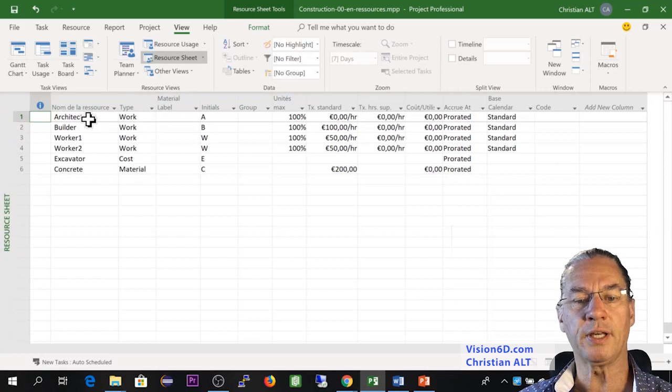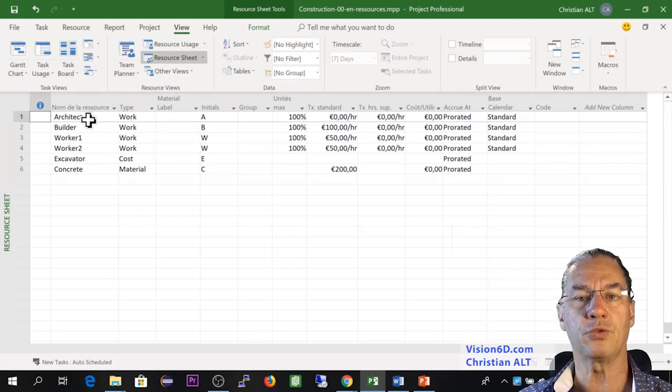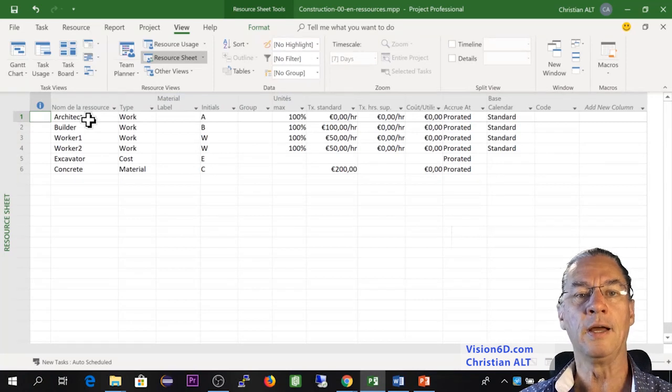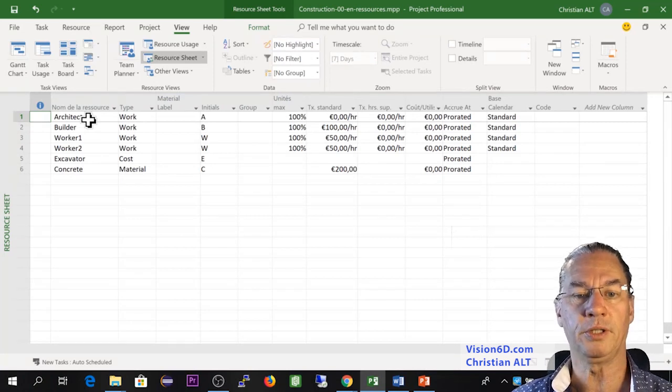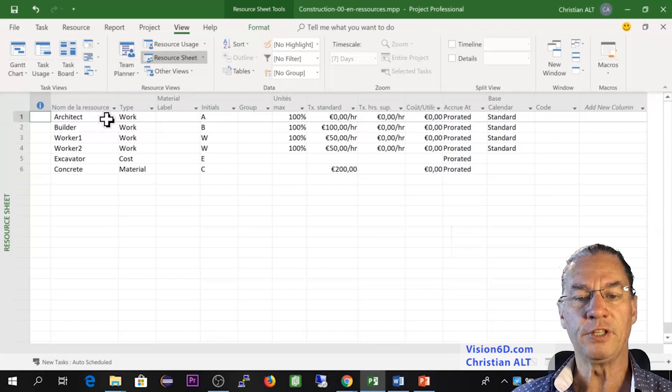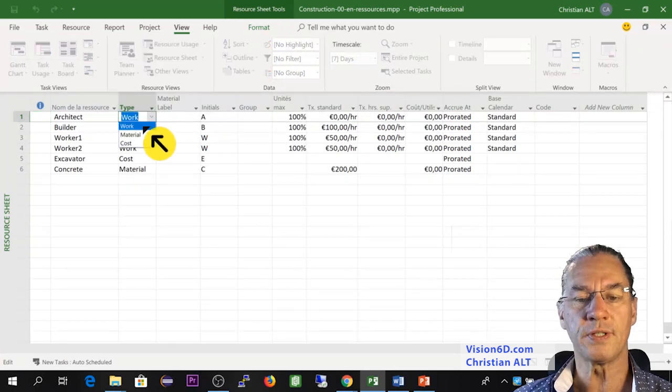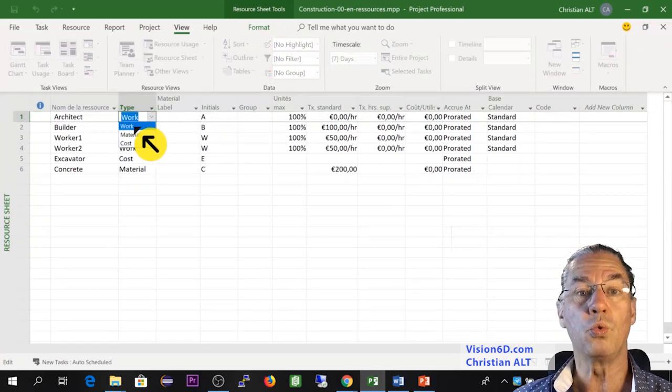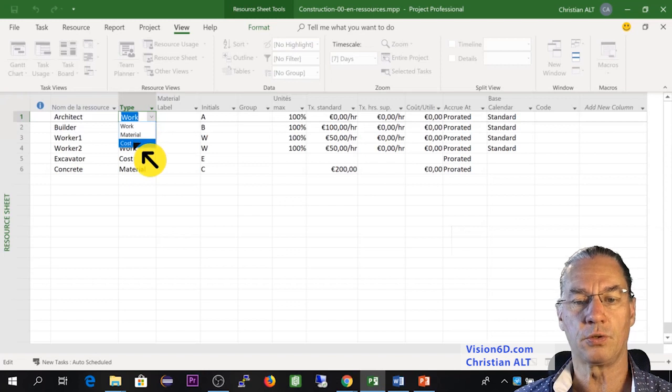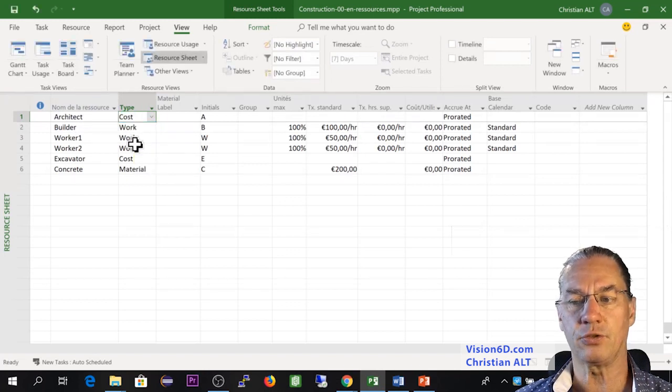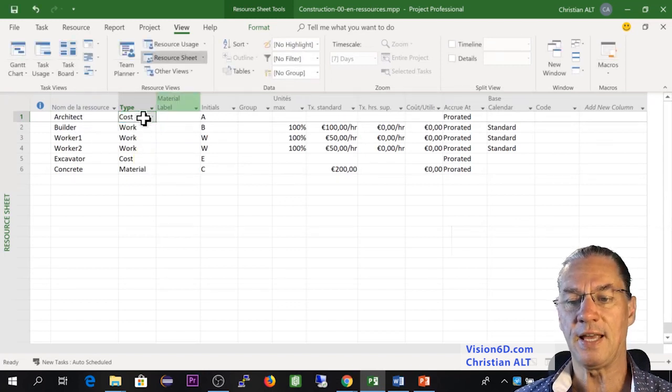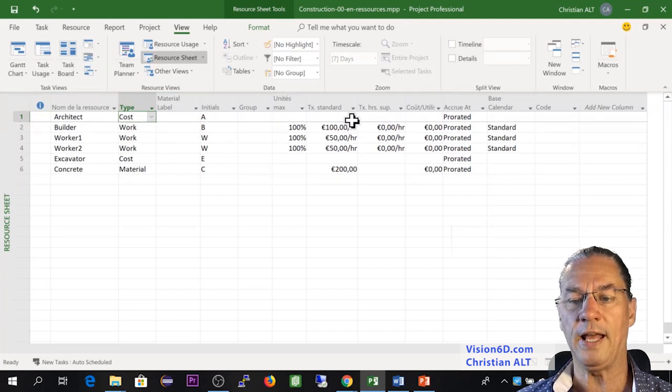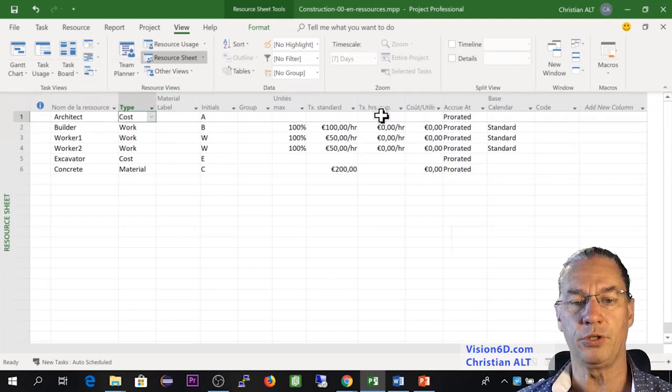In our case, the architect will make us a flat rate for all the work of the preparation of the permit request. So for this, I need here to change the resource from a work resource to a cost resource, since it's a flat rate. So this has been changed and you see that all the elements here have disappeared.